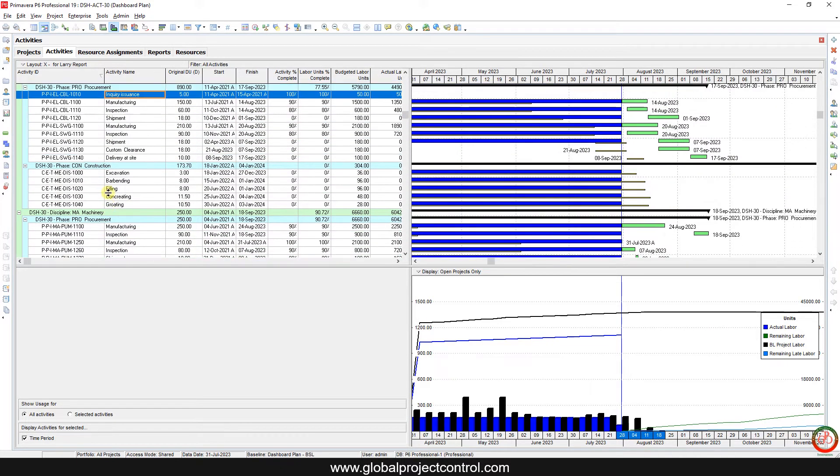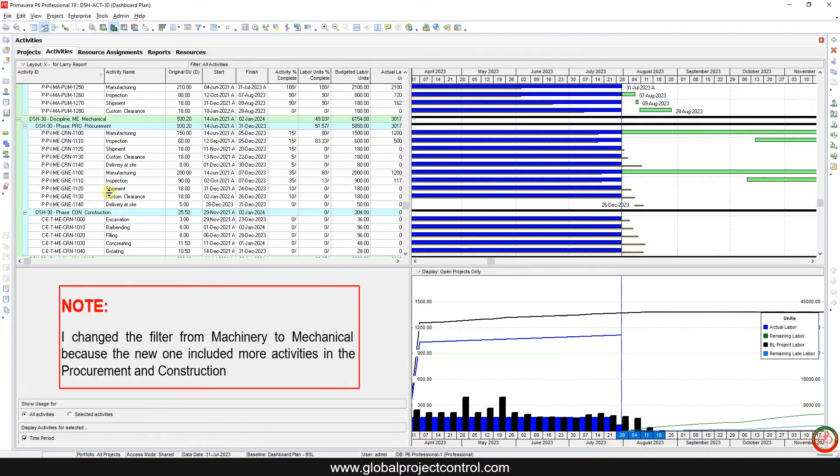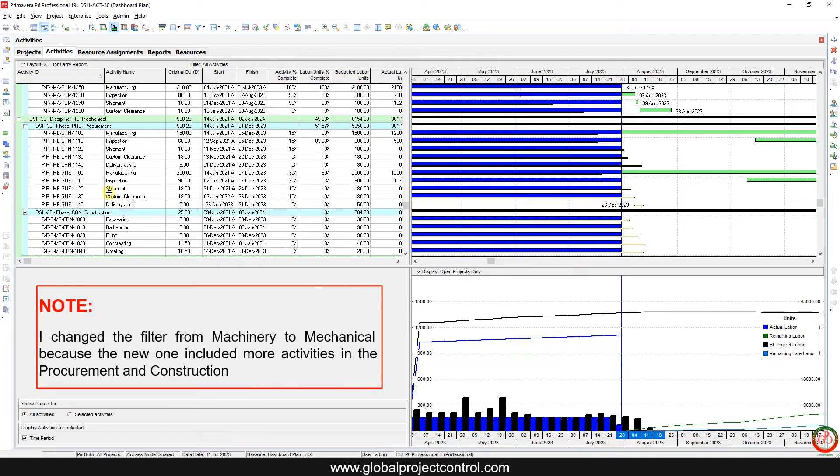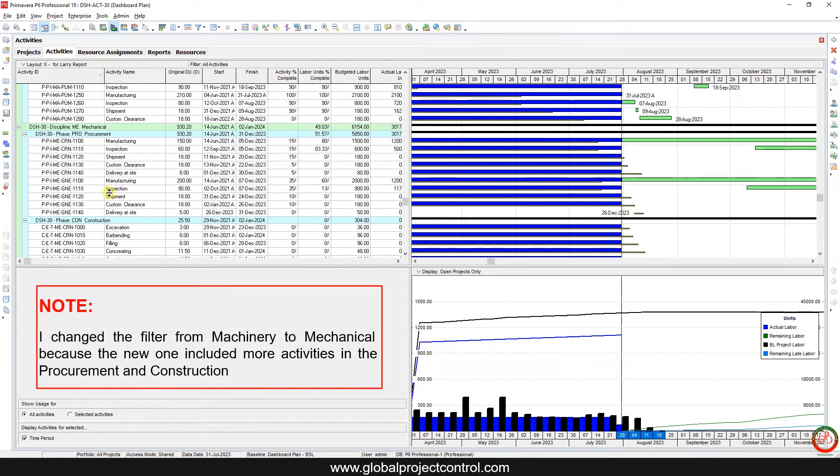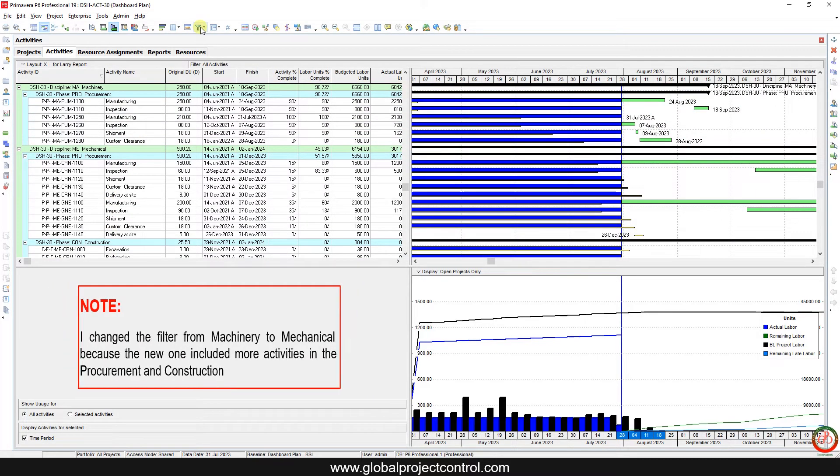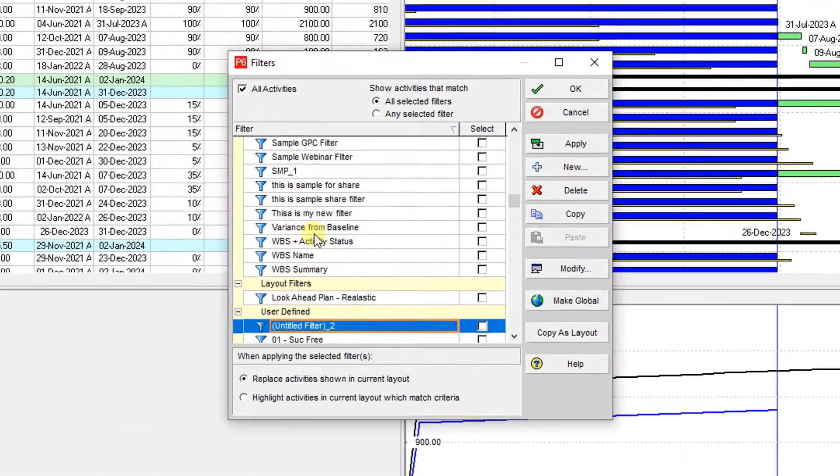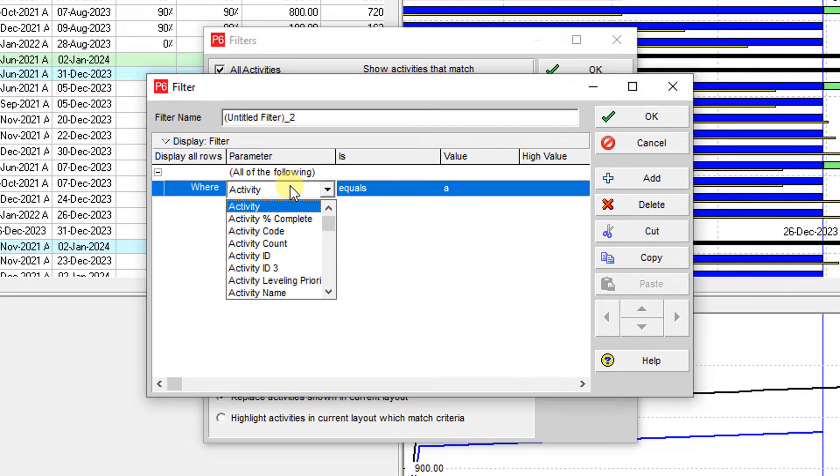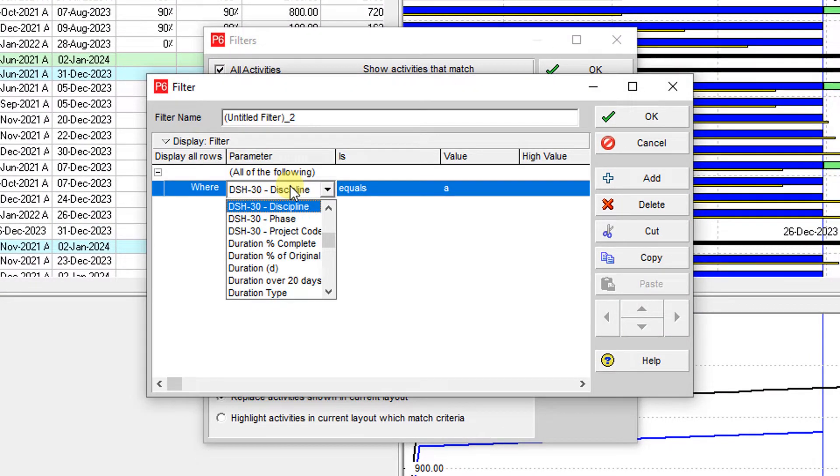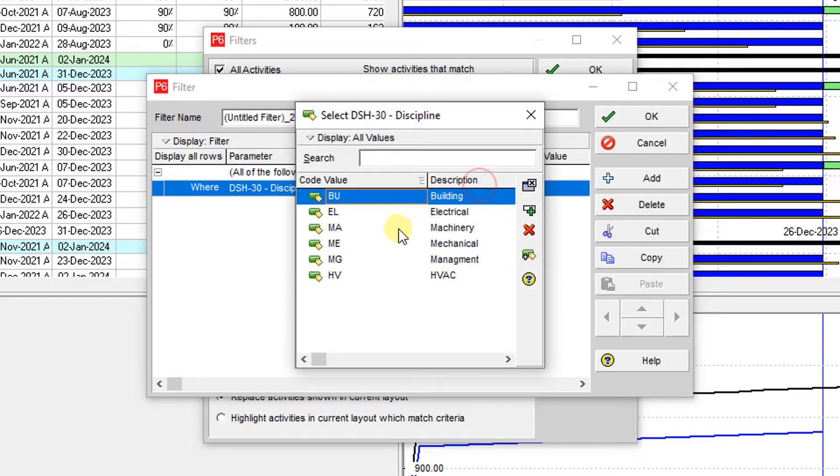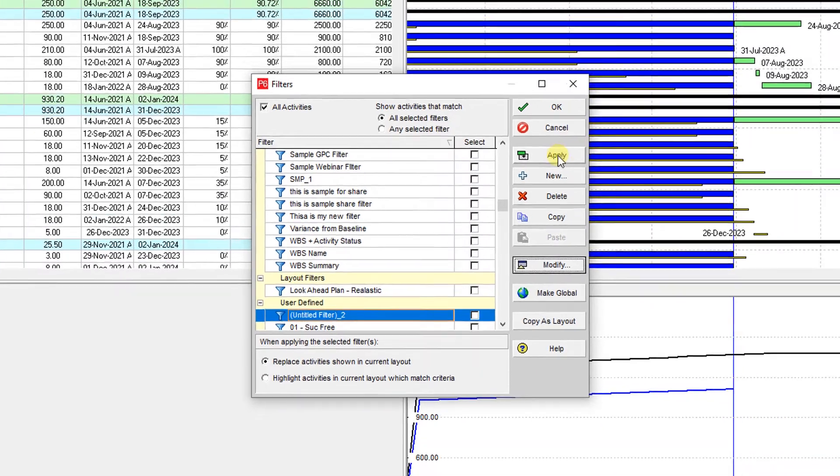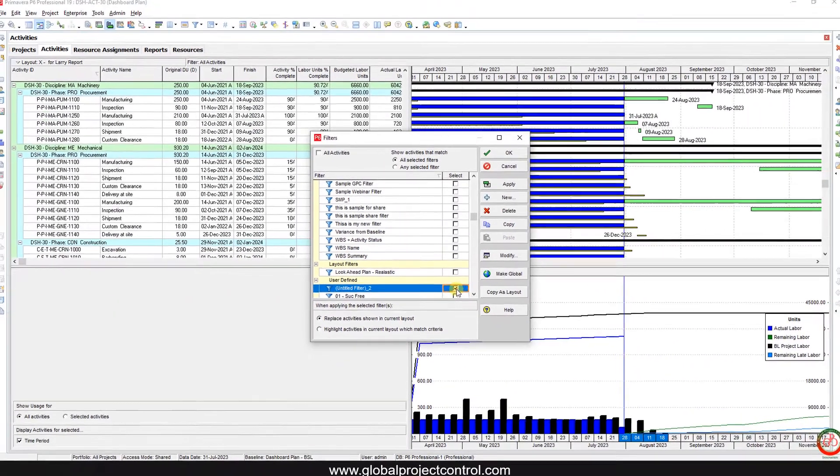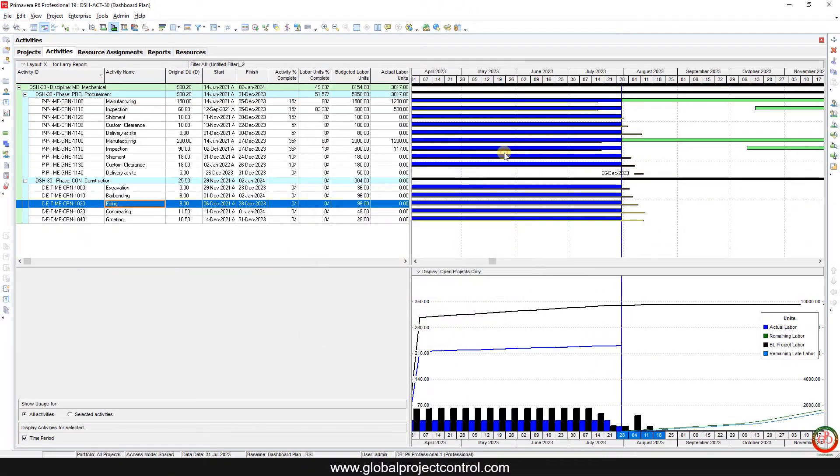But I only want to focus on one part of this information. I want to look only on mechanical, so I go to the filter and change it to the discipline is under mechanical, then I apply it.